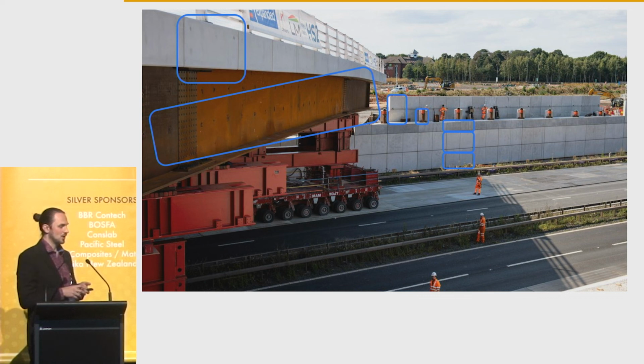So if you have the right approach and the right facilities, you can achieve this. And I think on the construction program, when you're building the entire abutment, it might take them less than a week, or a couple of days, to place all of the precast abutment. In a normal in-situ world, you'd spend weeks doing all your temporary formwork and another few weeks or even months doing all your in-situ rebar. So you gain some significant benefits.